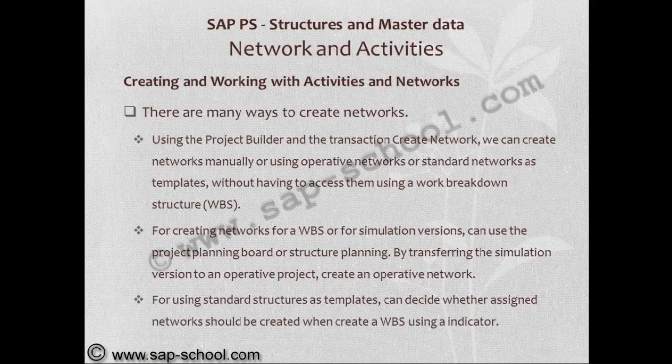There are many ways to create networks. Using the project builder and the transaction, create networks. We can create networks manually or using operative networks or standard networks as templates without having to access them using a work breakdown structure.